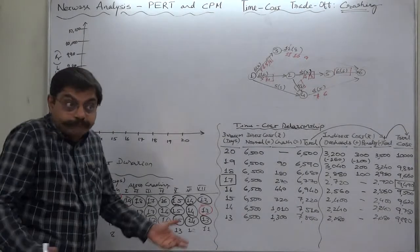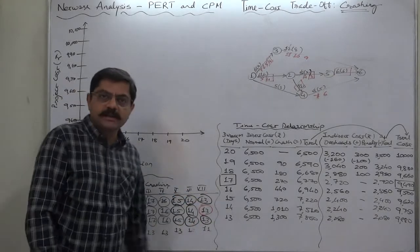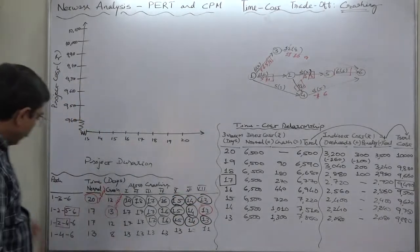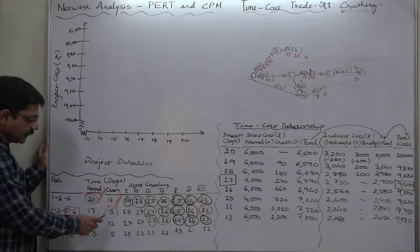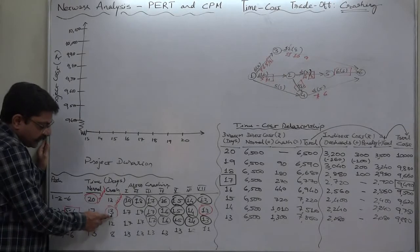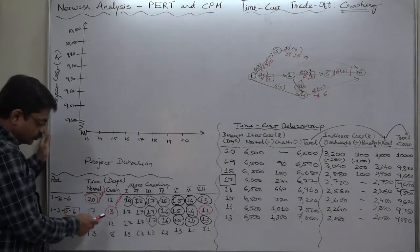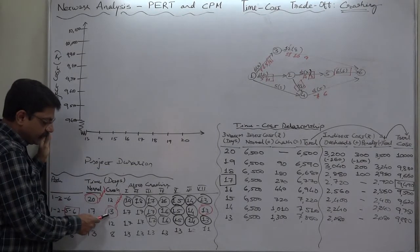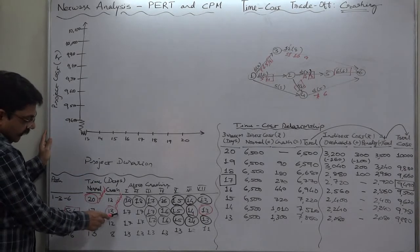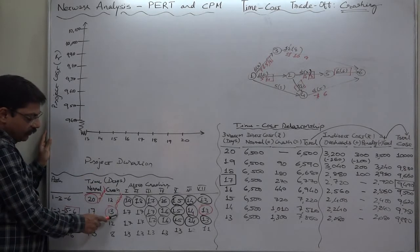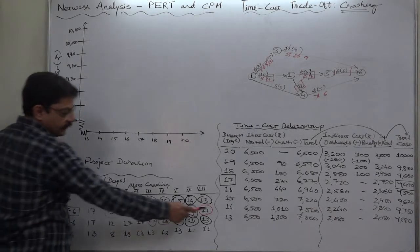Because in case of this path 1,2, 2,5 and 5,6 the further crashing after 13 days is not possible, which actually we had already examined in the beginning. After crashing this can have the minimum period of 13 days that we have reached.